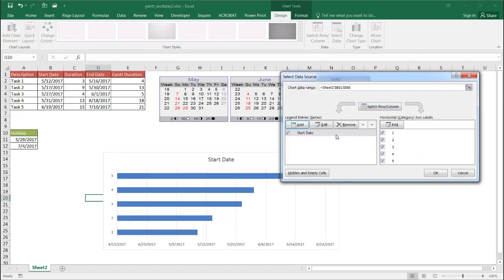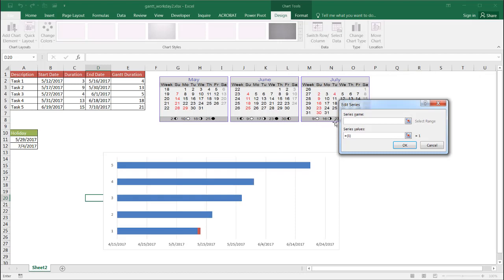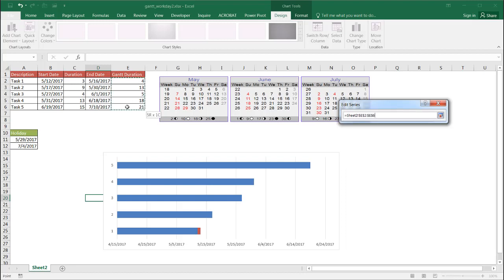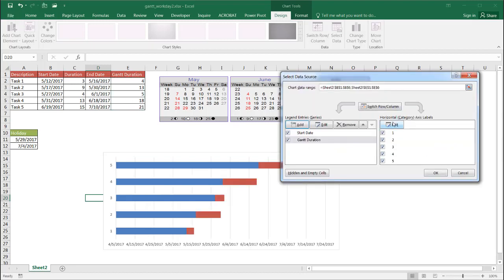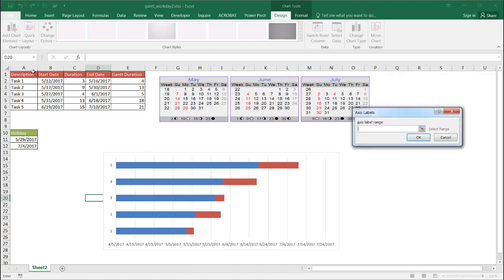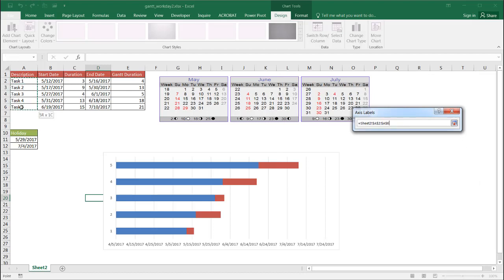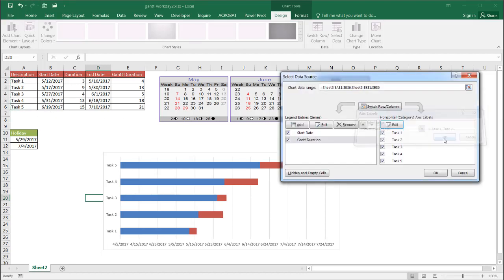Now I'm going to select the data. Under the design tab, go to select data. The first one I'm going to add is the start date. Click on add, and the series name is start date. The series value will be my start date. Click OK. And my second one I need to add is going to be the Gantt duration. I'll go to add and series name is Gantt duration, and the series value is the set of values. Click OK.